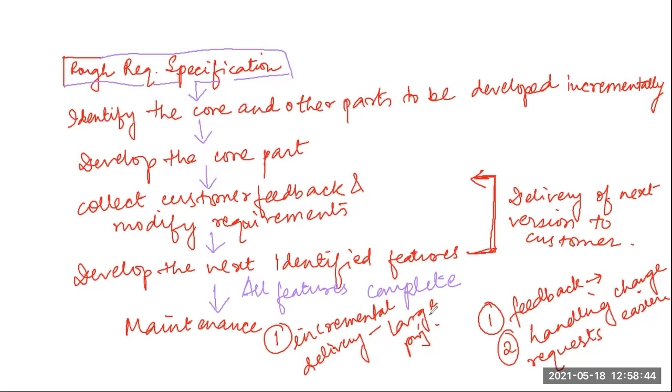So first of all, it is time consuming. Second, if I constantly do that, it may differ from the design which I first started with, the design that is documented in the SRS document. So there can be a mismatch between the two. So these design issues are a problem. So these are the two basic disadvantages, but they are not so strong in comparison to the advantages they give.